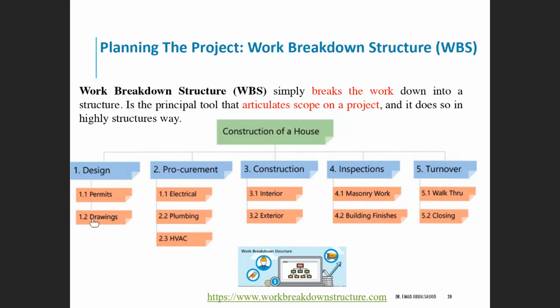If you have another level where other sub-activities also come, for example, you have 1.3, so you can have 1.31, 1.32, 1.33. If those are sub of the sub-activities of the design. For example, it could happen especially if you have a big project, or if you would like to scope down the activities into a narrow level. So we end up with a comprehensive list of every activity that needs to be done in the scope of the project.